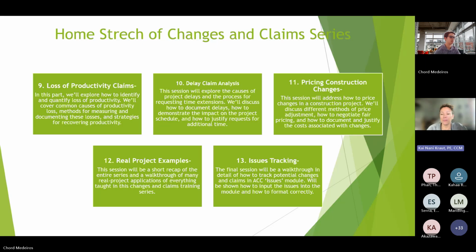Yes. So the RE was there. We eventually did the change order with the force account, but we were in disagreement on the force account value. That is why the change order took so long. But the change order was executed, I think, the day before they mobilized, or the day after. So not only did they have a field order and a memo, but they also had a change order that obligated them to do the work. And so, yes, their voluntary demobilization is what we're dealing with right now.